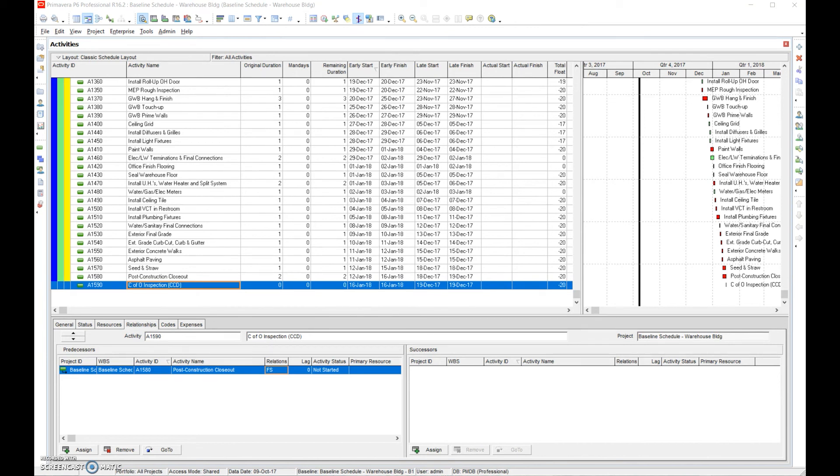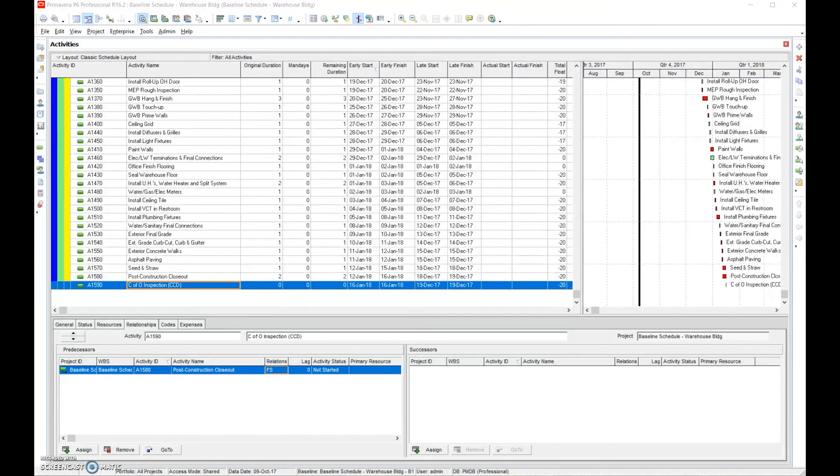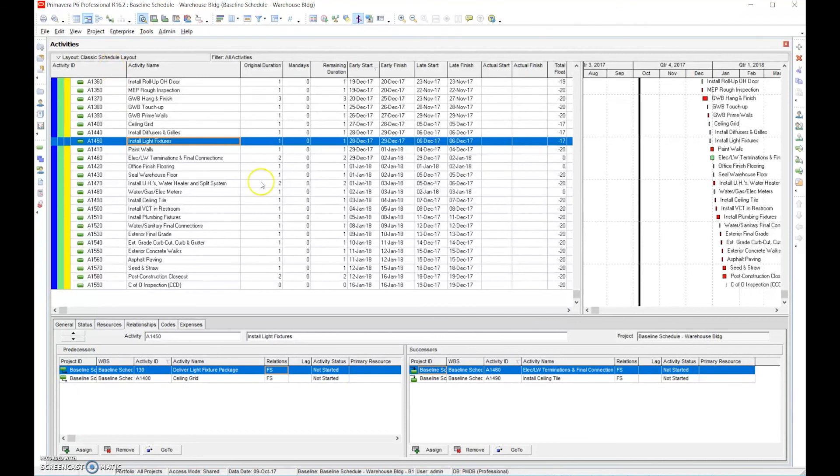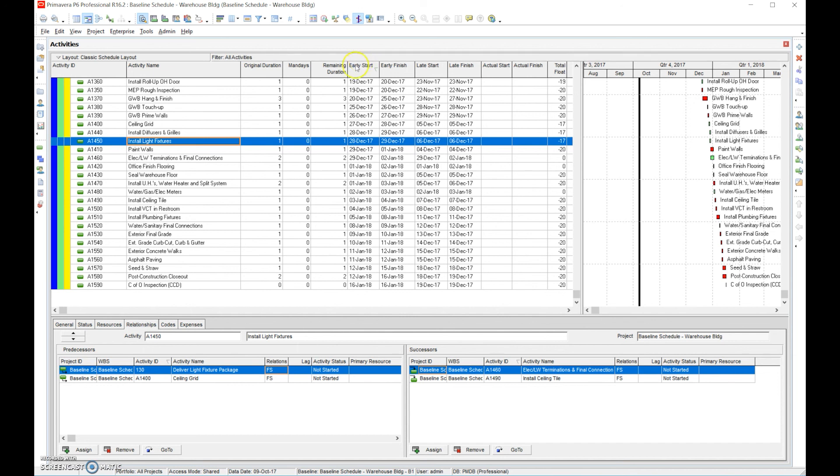So once again, document, document, document what you did, how you did it, and when you name it, you name it as a recovery schedule. And you'd present the schedule update and you'd present this as a recovery schedule. So recovery schedule, we're basically changing things from the original baseline, the relationships, the durations, and all that stuff. It's okay to do that, but you have to acknowledge that you did do it because we have to give the owner an opportunity to say, okay, well, we agree or disagree with it. So that covers recovery schedule.